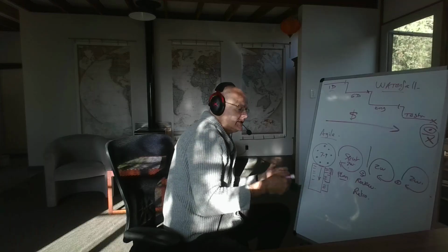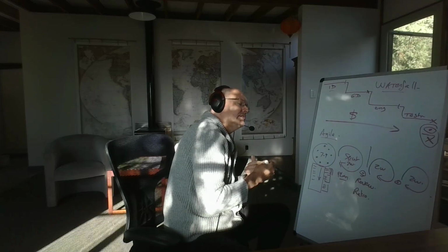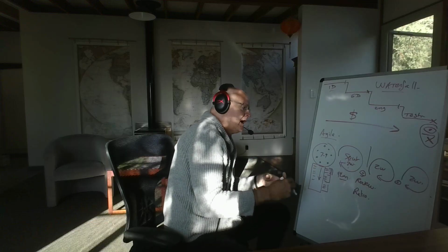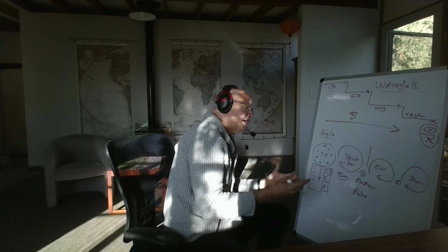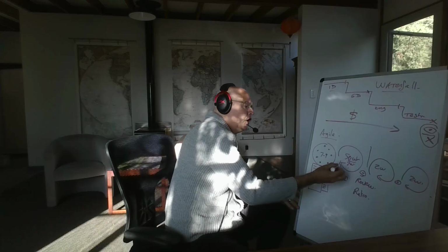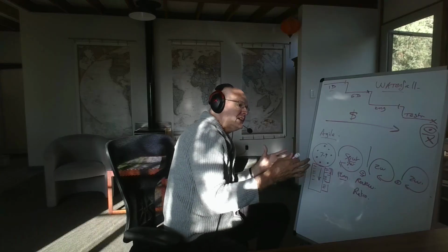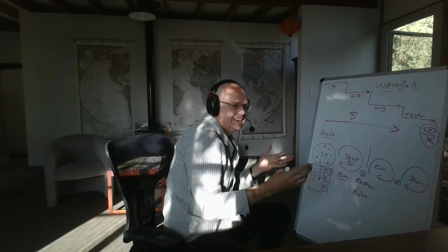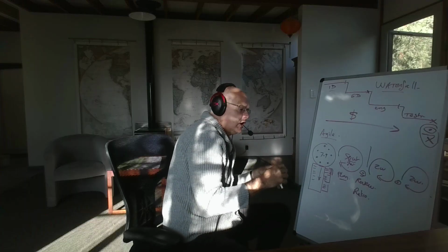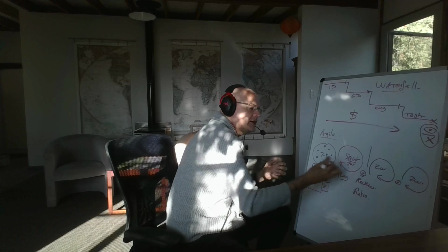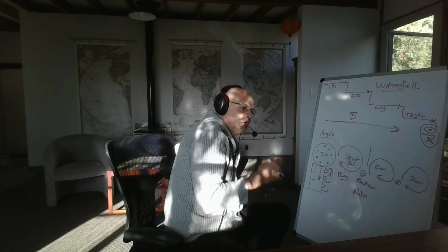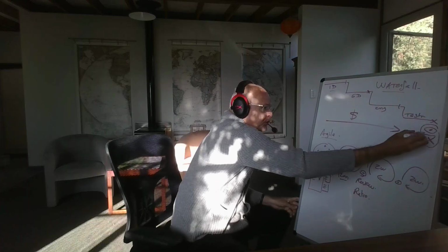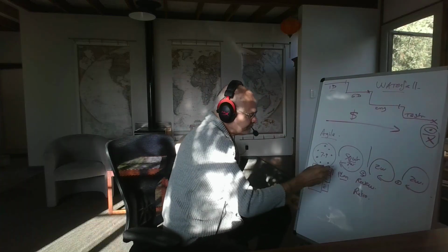So, sprint planning is the team coming together, looking at the next couple of weeks, and based on their capabilities, agree that at the end of the next 2 weeks, which is called a sprint, we think we can deliver all this fully functional. Obviously, it's small, right? It's not the whole game, right? It's a small little chunk. But the idea is that in 2 weeks, we can actually play it and look at it and then based on that decide what's next. So we've brought that first look way earlier.